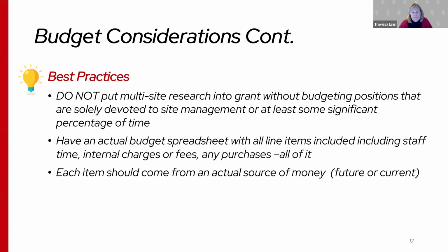Have an actual budget spreadsheet with all line items included, including staff time, internal charges or fees, any purchases. Just make sure you include all of it when you're planning out your budget. And each item should come from an actual source of money, either future or current.